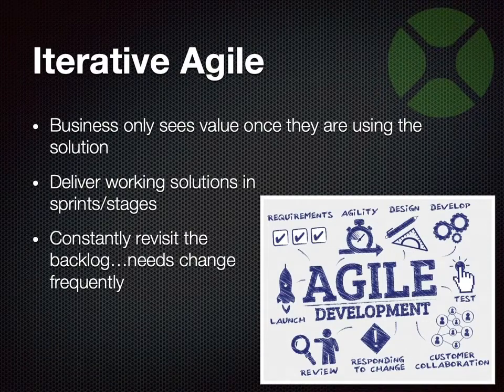The other thing I talk about here is constantly visit your backlog, because the business changes. And I'll get that into my next slide as well. Delivering something over a year, your business is not going to be the same as it was at the beginning of that year than it is at the end of the year. And if it takes a year for you to give them their first functionality that you've been working so hard on, likely it doesn't fit them as well.